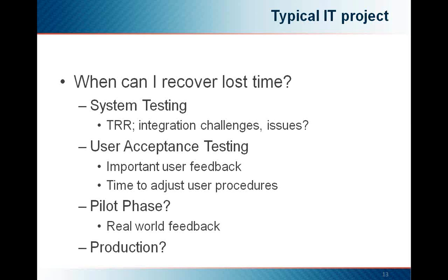Likewise, the remaining phases provide little room as well. Shortening the user acceptance testing could leave out some important feedback or the time users need to adjust and validate the business processes. Pilot and production phases leave little room as well.